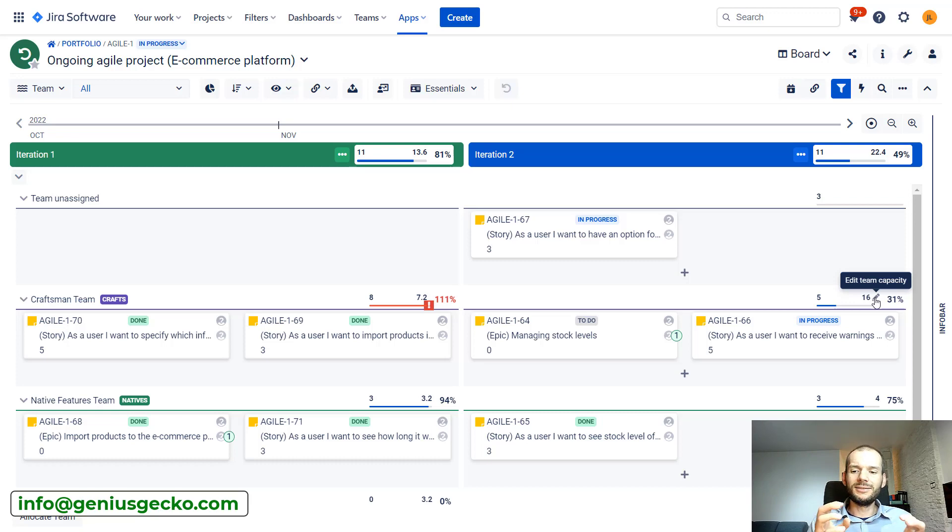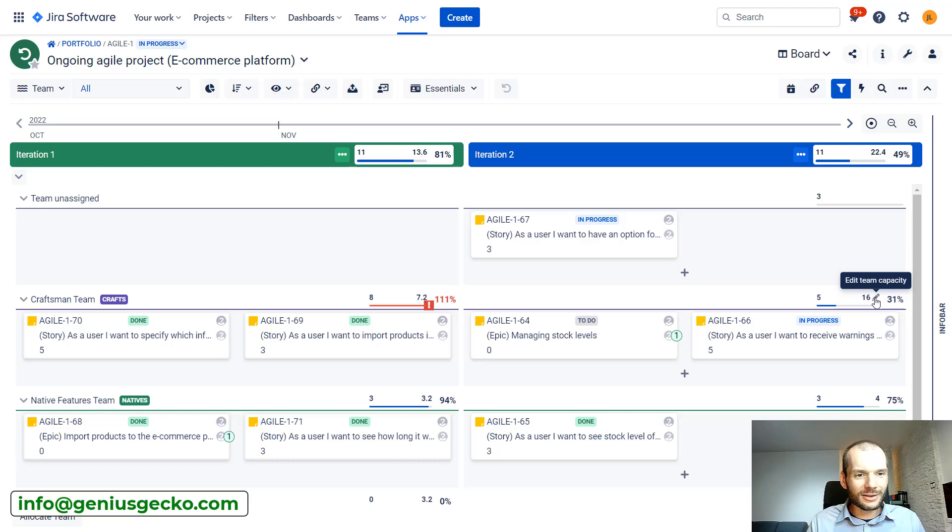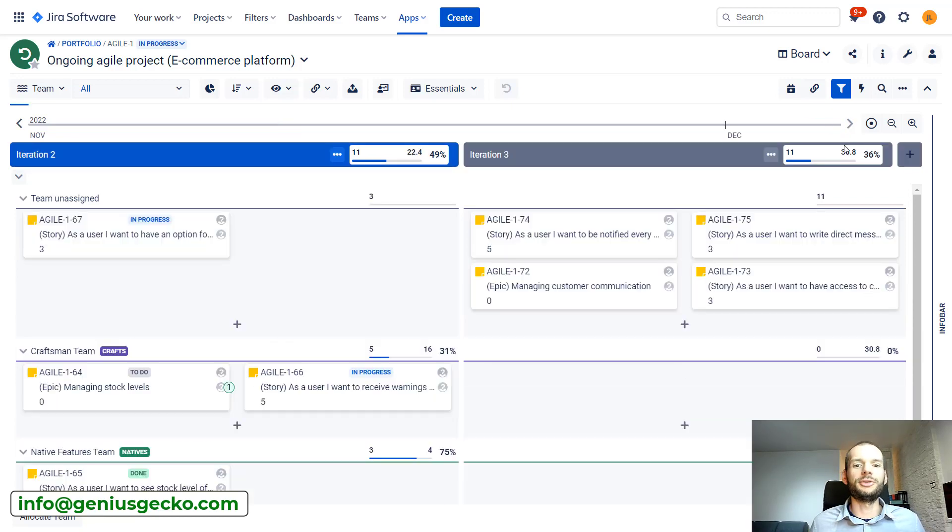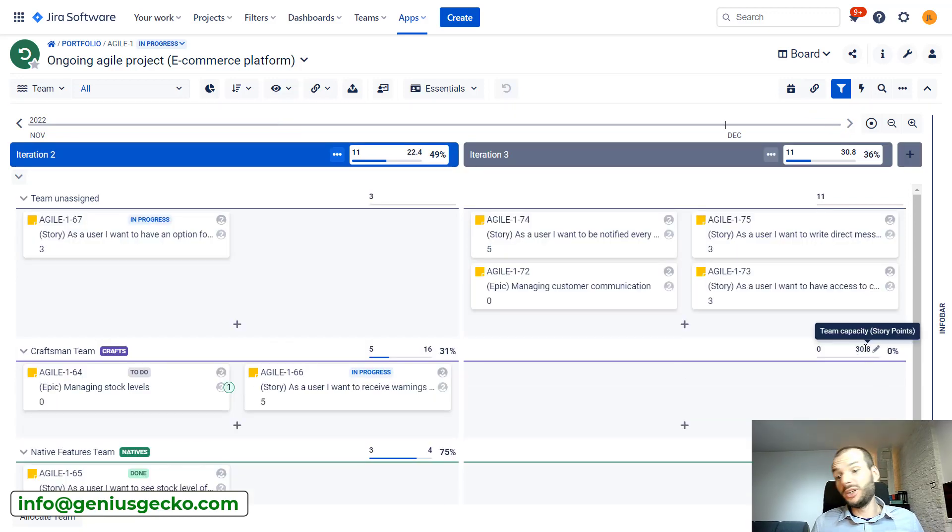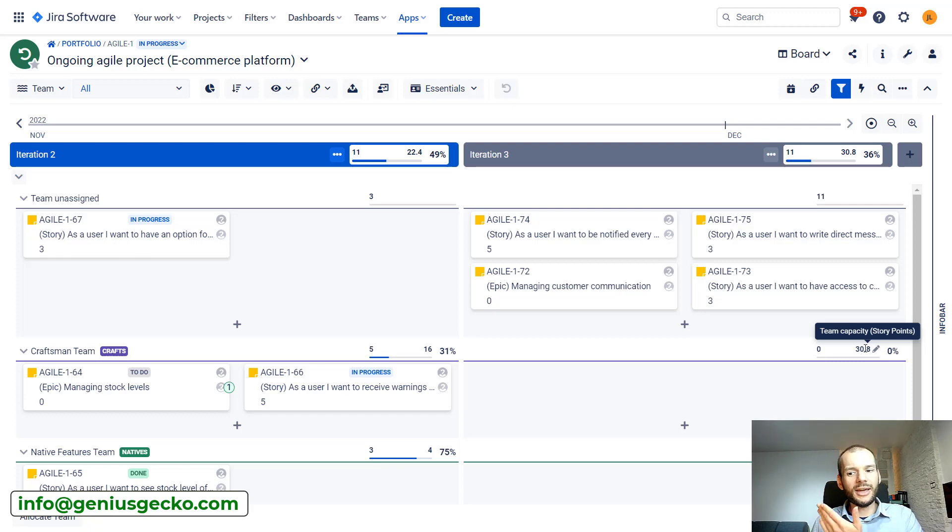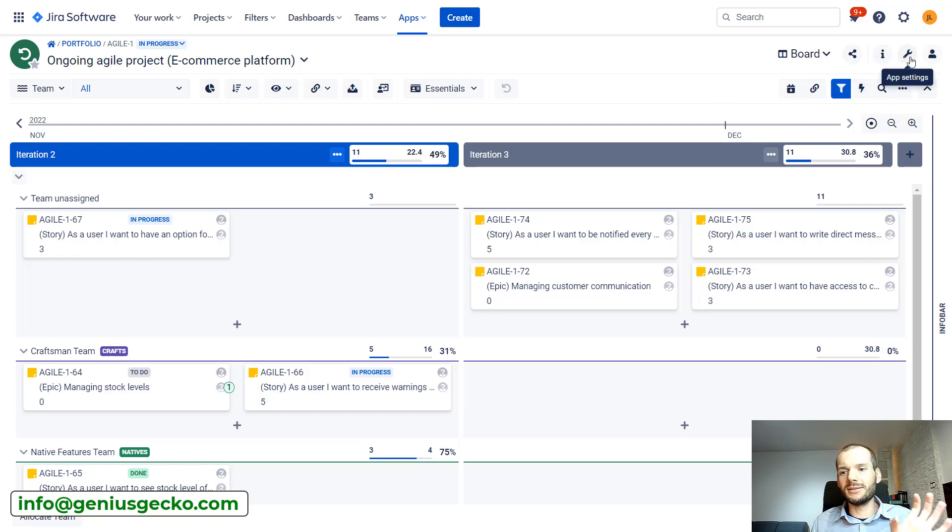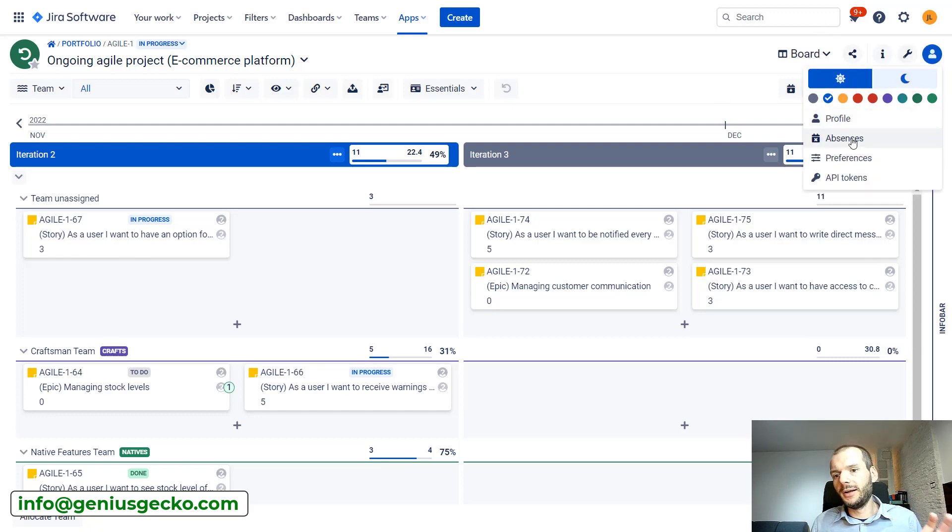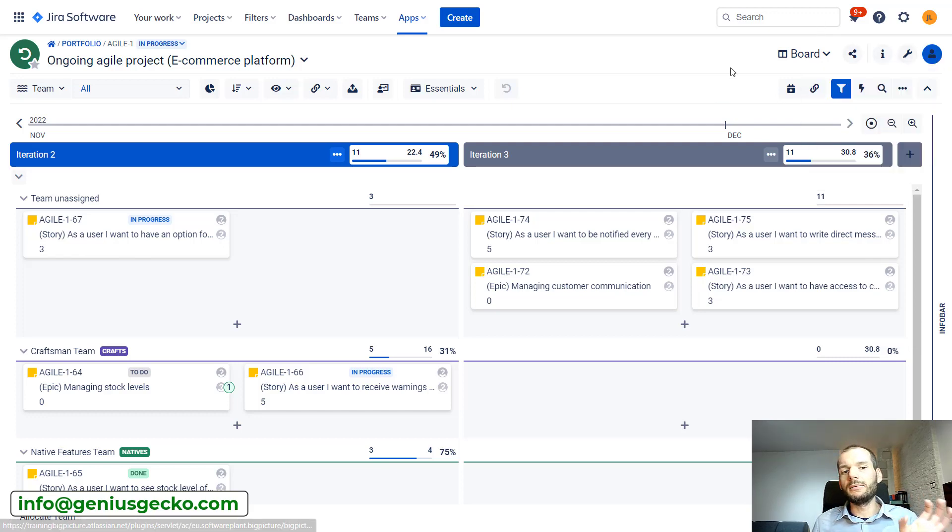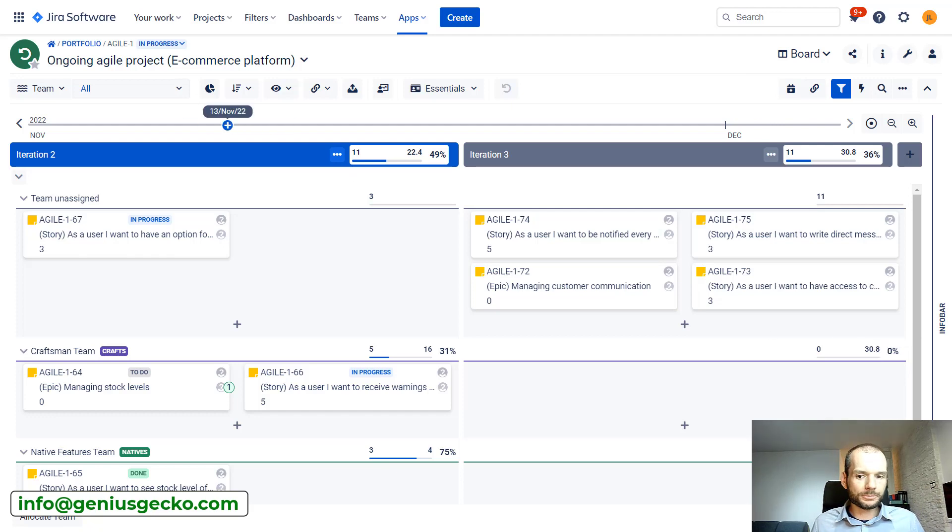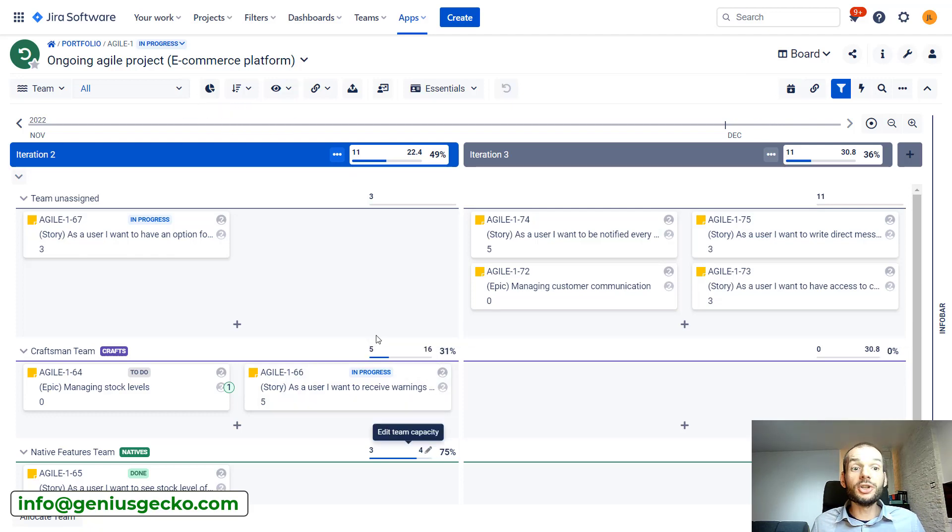This is really easy, manual, but also gives us a lot of flexibility. If we know that half of our team is sick for the next iteration, they want to be here. We can manually say that, okay, half of the points is okay. We could leave it to Big Picture. If we put absences in Big Picture, it would work. It would just cut in half, but you can also do that manually.